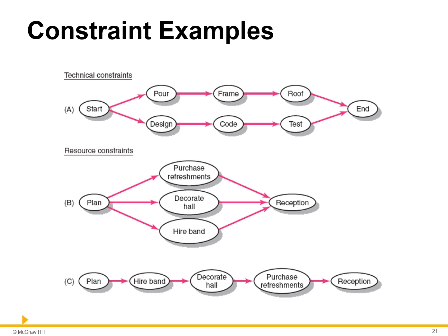A network of a new software project could place the activities in the network as a consequence of 1. Design, 2. Code, and 3. Test. In other words, you cannot logically perform activity 2 until 1 is completed, and so on. The project network depicts technical constraints.